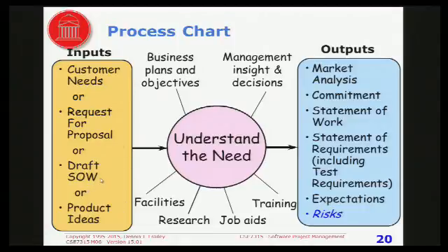A draft statement of work, that's an interesting one. Sometimes the customer will give you a draft statement of work. Now, imagine if on assignment 1 I had given you the statement of work and I said, that's a draft statement of work. You tell me if any of it should be modified. Now, why would you want to modify the statement of work? Well, you look at it and you say, it's going to be hard for my company to do it that way, but if we change it in this fashion, then it's a lot easier.